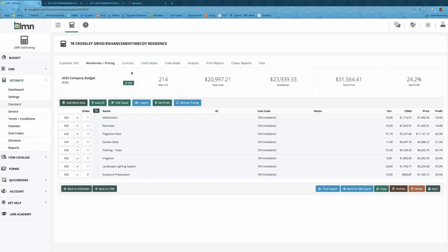So sometimes what I've done in the past, particularly when bidding big jobs and big opportunities, is I've created a duplicate of my budget and added the revenue, labor, any additional equipment and material into that budget to see what my overhead would be based on having that huge job.